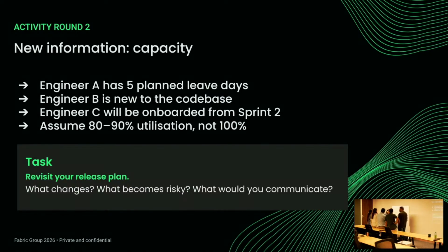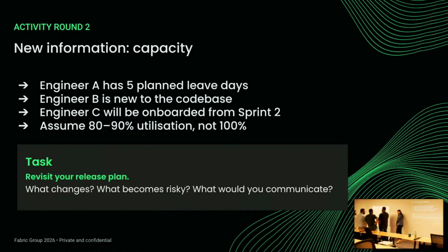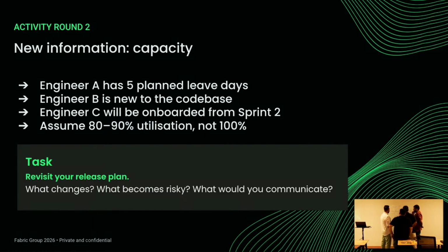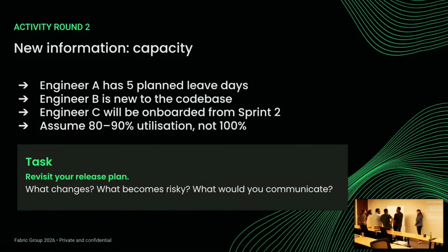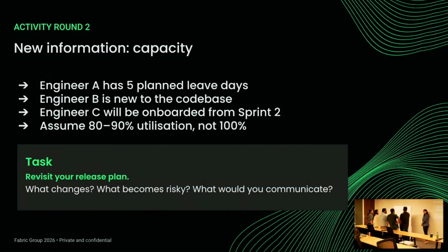Accommodate for unplanned leaves. Yeah, so that's the utilization factor, that's the 20%. Do you have any doubts? What actually happens with daily work on every sprint is that however experienced the candidate is, they may go 12 while the other person goes 6 in a complete day. So the overall remains 0.8. And if somebody leaves, then 30 becomes 29 into 0.8.